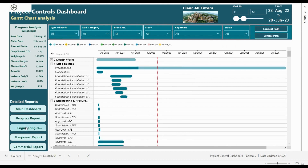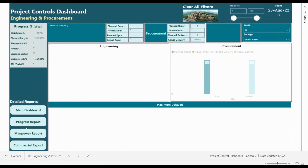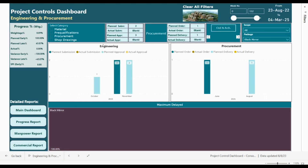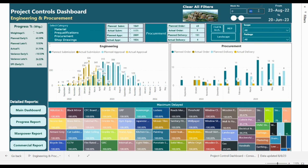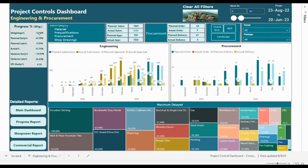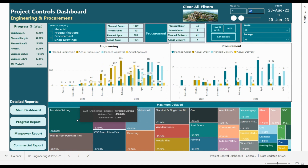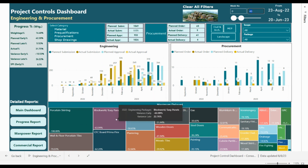Now we will move to the engineering dashboard. We will clear all the filters first. At week number 43, this part shows the weightage of the engineering: planned, actual, variance, and the SPI. This is a graphical presentation of the engineering and procurement, and the box here is showing the most delayed package — we have mostly items like balustrade and skirting for example.